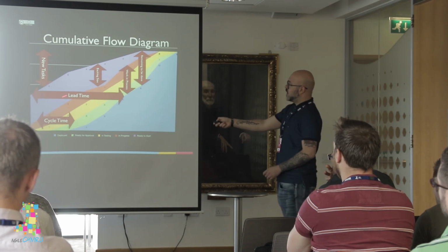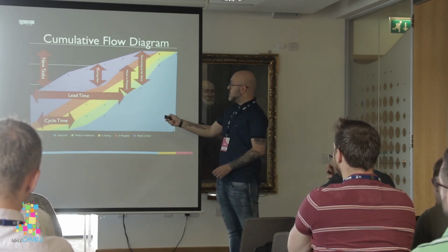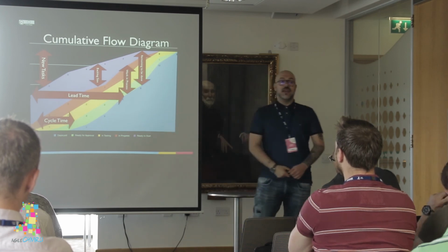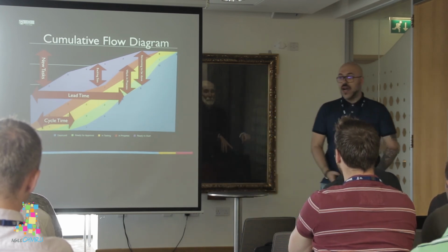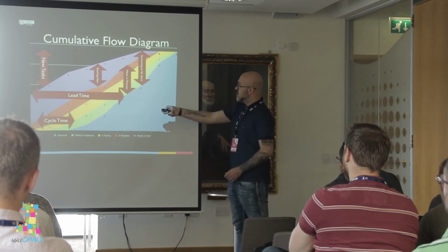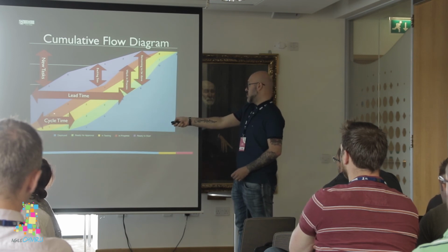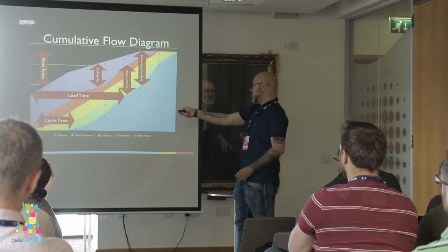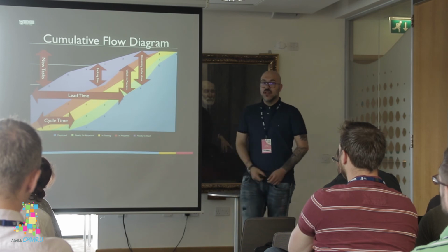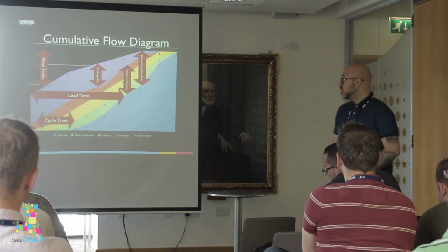So basically here there is the analysis phase, and as you can see here, backlog is increasing. So it means that the customer or the company added more stories to your backlog. And you can immediately spot it because there is this gap. Then the progress starts to go quite well, and then drops off. So what's happening here? Probably a new person inside your team, or someone that went on holiday.